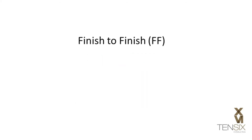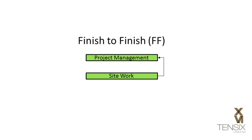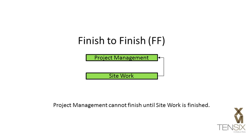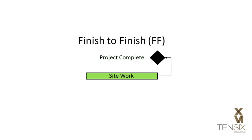Finish to Finish is used to describe a finishing dependency between tasks — one activity cannot finish until another activity finishes. In this example, project management cannot finish until the site work is finished. This relationship is commonly used with finish milestones.